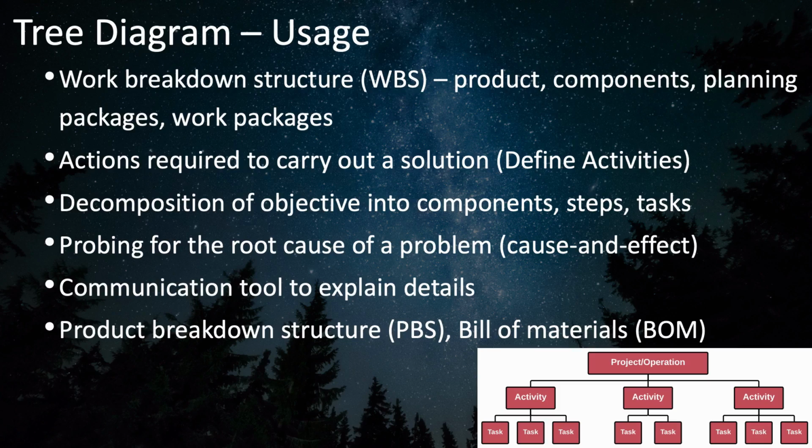The result could be a WBS with the product at the top, deliverables or components at the next level, followed by planning packages and work packages. Later in your project planning, you then add the actions required for each work package as part of the define activities process. A tree diagram isn't limited to physical things.